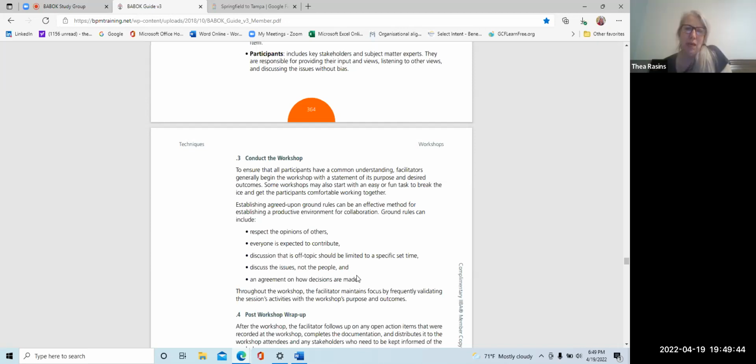So thank you. Right. Well, let me talk about the second type of workshop in a project. Typically, I'll have one for kickoff to get everyone together, and then I'll have one when we have about 80% of our requirements identified. And the reason I do that is there are requirements that you're not going to uncover, especially if it's a complex project, unless you have people of different viewpoints and different understandings participating together. And so whenever you get about 80% of your requirements, you've identified what your ideal process is going to be, as well as your edge cases.